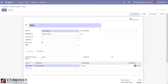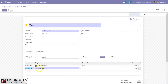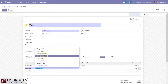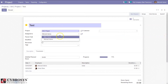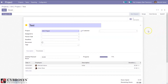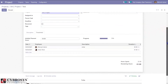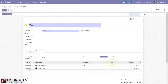If Mitchell Admin spent two hours on this task, you set two hours. You can also add another employee — for example, if Anita Oliver spent one hour on this task, you can add that. You can remove entries if needed. You can see the progress is now 75% because the planned hours is four and only three hours have been spent on the task.